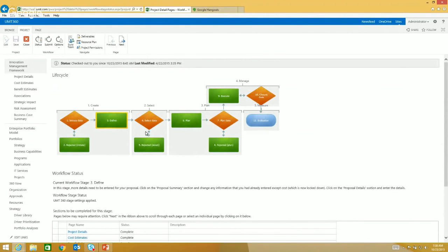For example, you can move into this decision point and have a snapshot automatically triggered through the workflow, recording cost, benefit estimates, metrics, whatever you want to record. If approved, it's going to move into detailed planning to build up the detailed business case. Then we're going to move into the final go, no go, where another snapshot will be created.